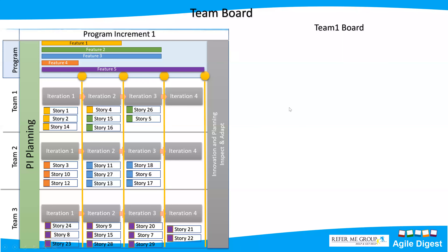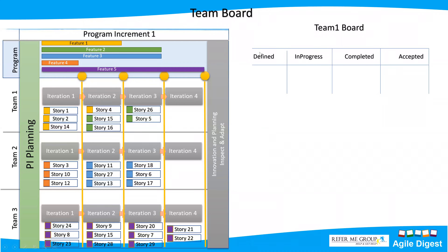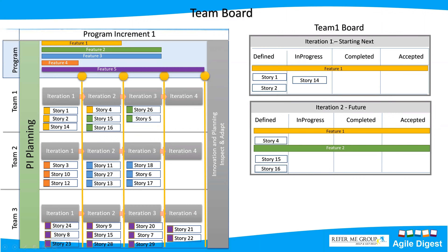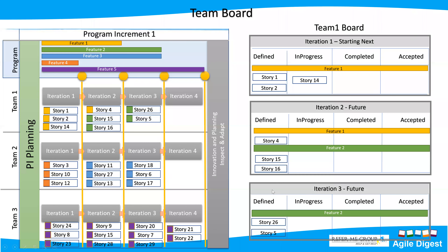Every team has its own Scrum board or Kanban board at the team level for each iteration, showing stories in states like defined, in progress, completed, and accepted. While all iterations 1 through 4 are executing, the program board shows one board with all features across all iterations. The program board shows features — not stories — and maps which team is completing which feature at which iteration, with dependency arrows shown.